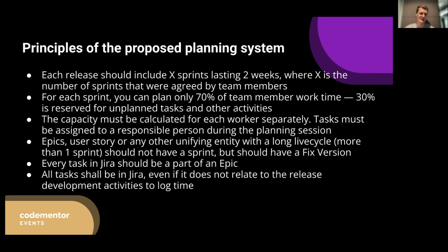The capacity must be calculated for each worker separately, and tasks must be assigned to a responsible person during the planning session. The first part of it stems from the fact that before each planning, you need to check for vacations, for sick leaves, for any kind of thing that decreases your total available work hours, and you need to plan tasks for each team member according to the available work hours or work days.